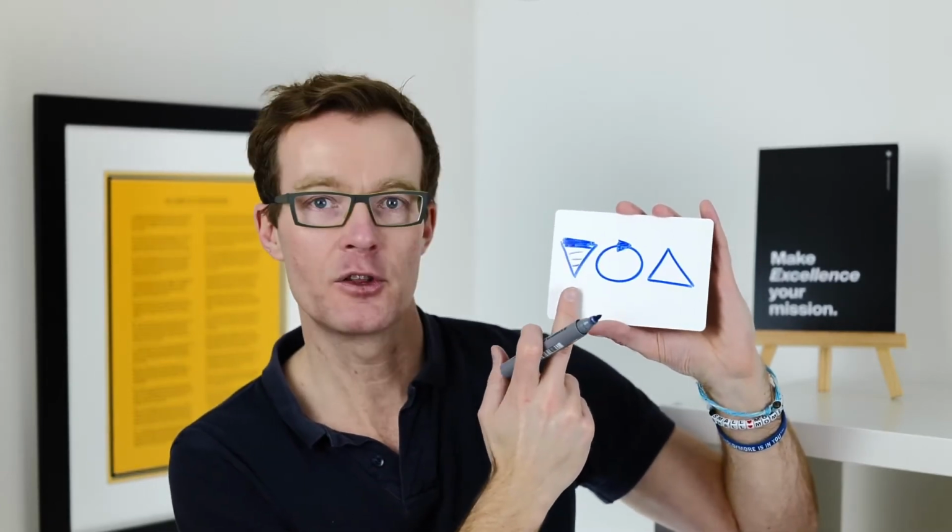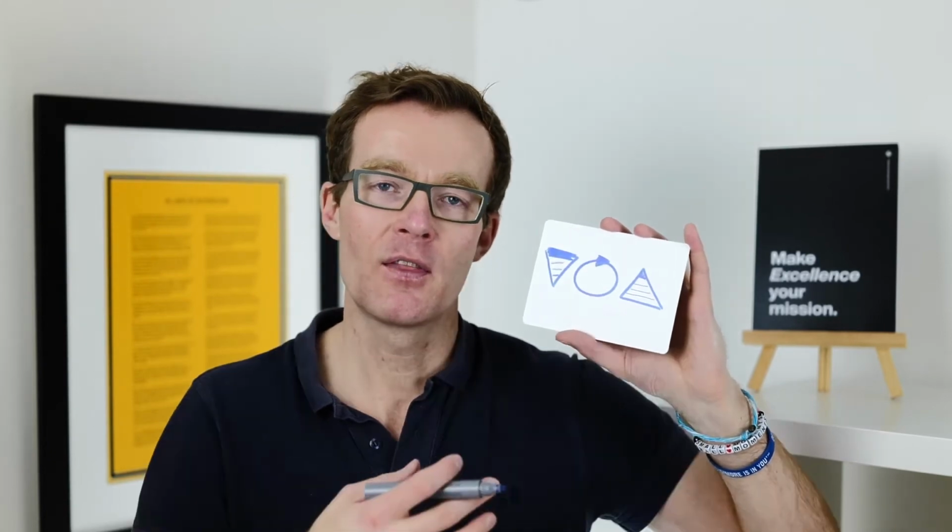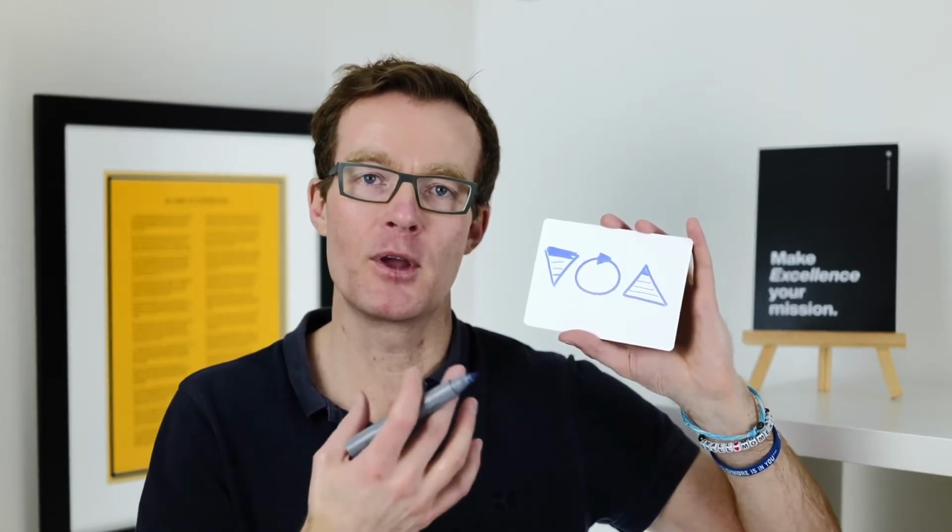So we've got the beginning, the scope of the project, the middle of the project, and this end part here, which is the handover. And this is where we start handing over small bits to begin with, up here. But then as the project is getting nearer towards completion, we hand over larger bits of that project. And that's not just documents, but that could be procedures, it could be your tacit knowledge, it could be systems, all the different ways of doing things associated with that project, lock, stock and barrel.